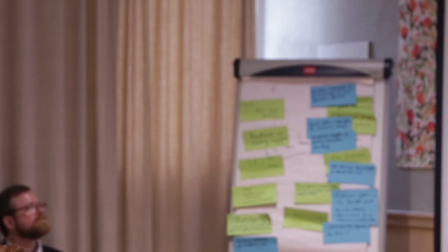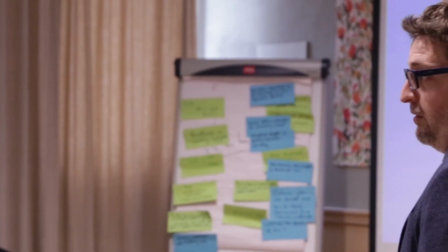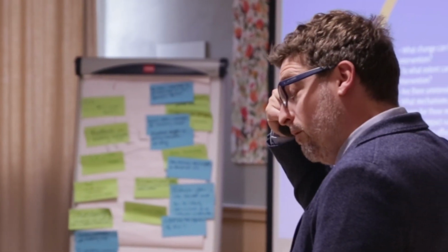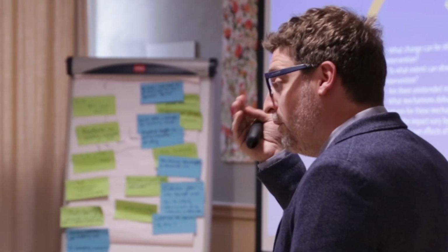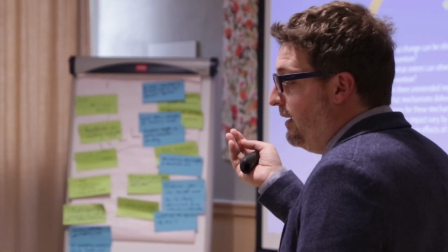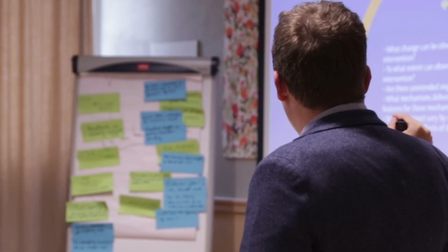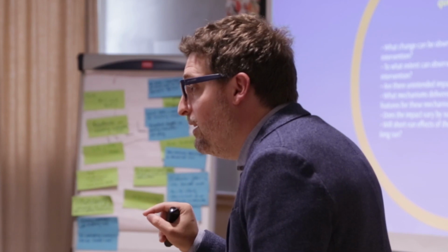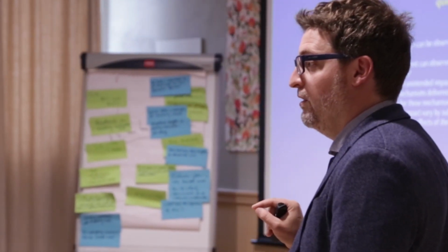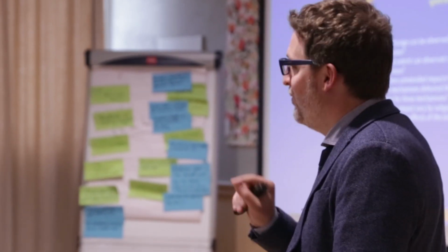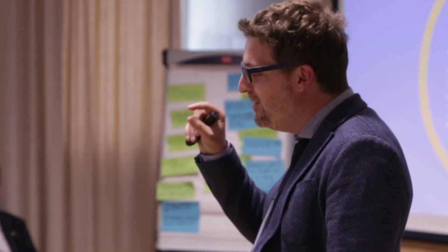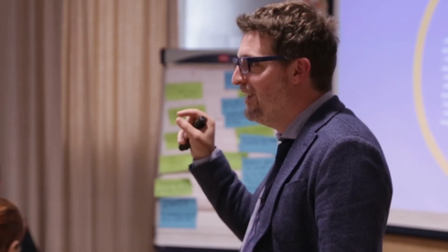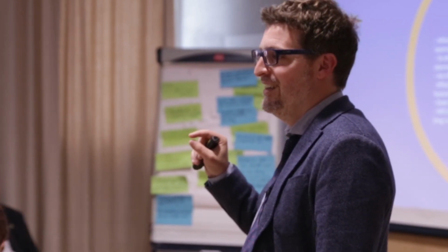Obviously, you can't really answer all of these questions. What you have to understand is whether there is anything to answer or not. And I think I can already say it here: if there is no implementation, there is no point in doing an impact evaluation. Okay? Because whatever the conclusion is, it will not be because of your contribution. So if you are at a 0 selection rate, no expenditure, postpone your impact evaluation.